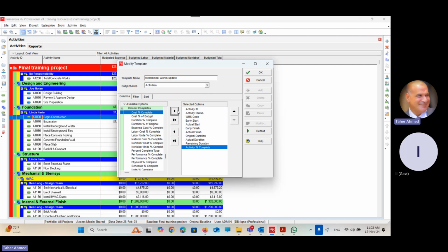Is this good information to be submitted for someone to update his activity? Yes, it seems like that. I will send the information in Primavera, which is planned, and he will do the actual. He will put the actual with a minimum training, 30 minutes training, just to train every one of the team on how to use the Excel sheet in order to put the actual. Later on, I will receive the actual each week or each month using this Excel sheet.